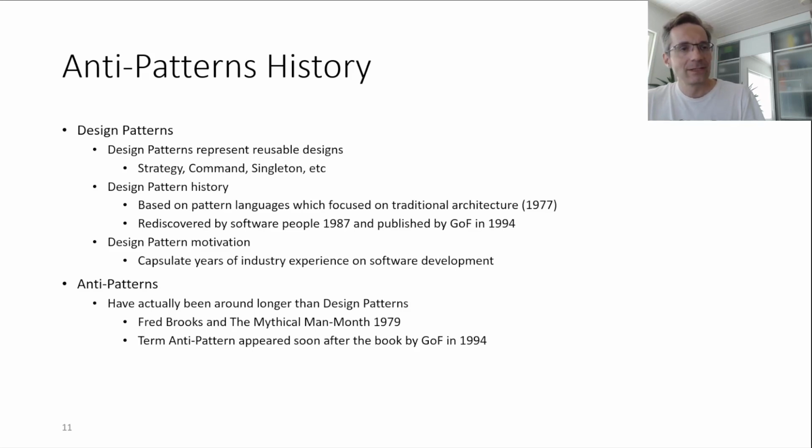This actually makes the project complete later. The law is that as you add manpower to a project that is late, it just makes it complete later. So this is an anti-pattern from already 1974. And coming back to this anti-pattern term, it actually appeared soon after the book of the Gang of Four was published in 1994.